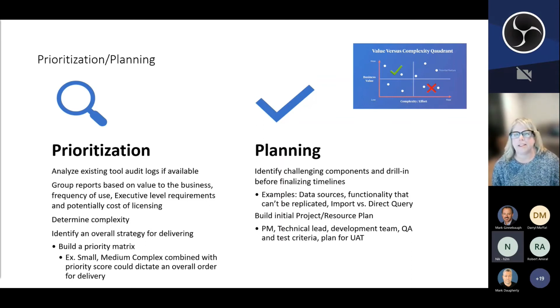That's another great place to start because you're going to get a quick win and a lot of adoption right away, and a lot of good jobs, that gets people happy to see what's happening and they see progress. So my recommendation is that you build out a matrix, right? That spreadsheet I talked about is a great start.